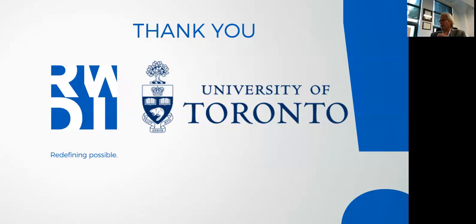I believe, and I can be corrected on that, that in the document that goes out that is bid on, there is actually a requirement for the designers to work with the commissioning agent. Yeah, it's actually outlined in the overall building commissioning standard as well, U of T's commissioning standard. It outlines, and so does CSA Z320, that relationship. There needs to be collaboration between those parties, right?